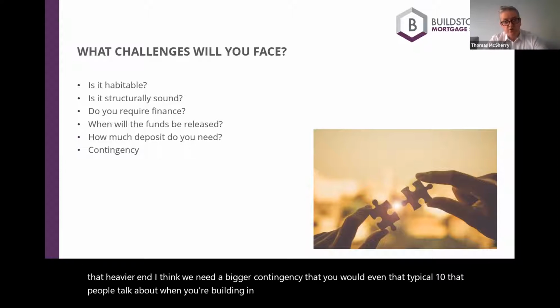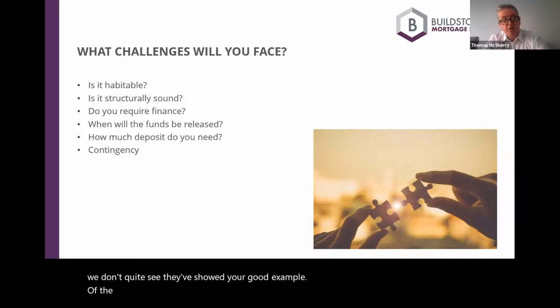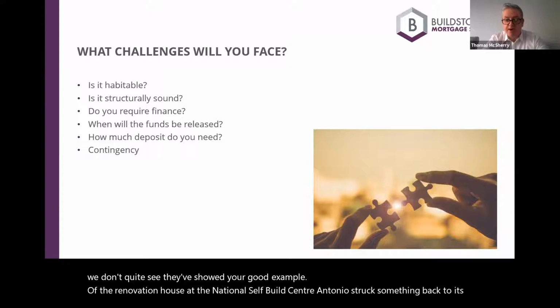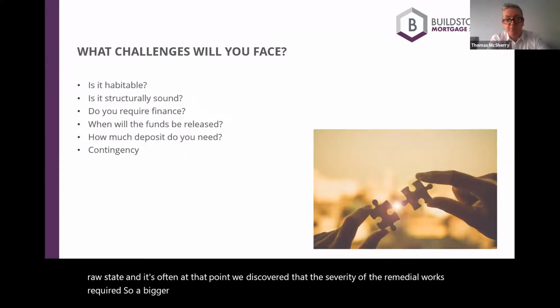So often until you strip a property, we don't quite see. Dave showed you a good example of the renovation house at the National Self-Build Centre. Until you strip something back to its raw state, it's often at that point we discover the severity of the remedial work that's required. So a bigger contingency is often something that's very important to consider.